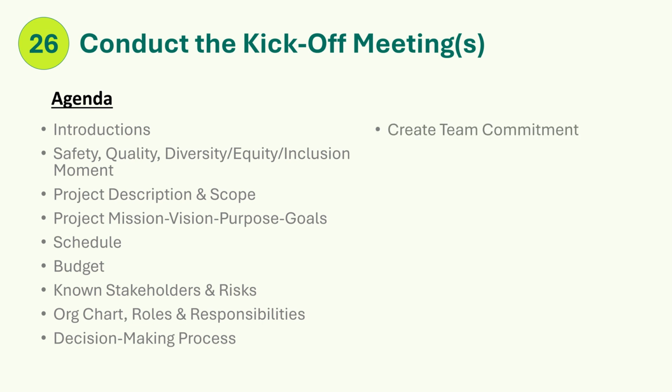Create the team commitment charter. Work with the entire team to draft a team commitment charter that everyone agrees to, and have each team member initial it. If this can't be accomplished during the kickoff meeting, consider having a separate team commitment and scoping meeting. Discuss how communications should occur. Decide what team meetings are needed, who leads, audience, and cadence.